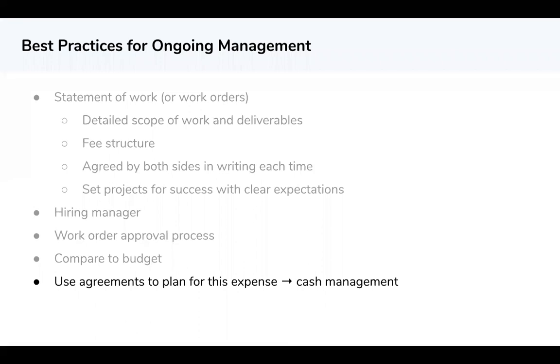At the very least, if you do these work orders right, you should always have good visibility into upcoming expenses, which will allow you to plan and manage your cash flow without any surprises. Many companies do not use a proper work order system and only know of expenses when invoices come in, which causes issues for cash management.